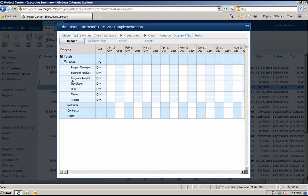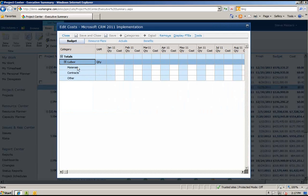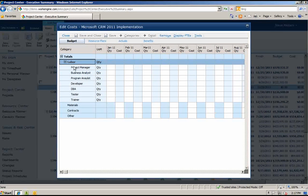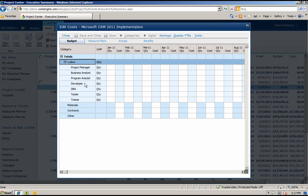The items you see on the left side of the grid are called Cost Categories. Cost Categories can be broken down into different buckets. Here we see Labor, Material Contracts, and Other. We can also add subcategories under a category to add more detail. With Work Engine, you can create your own cost category breakdown structure.